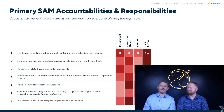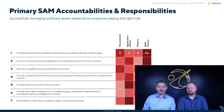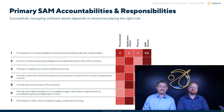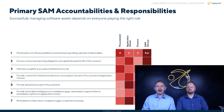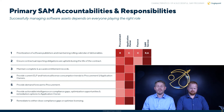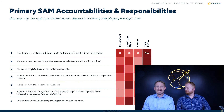Because you're working with all these different groups — whether procurement, security, or product management — they all report to different leadership, so it can be difficult to understand who is doing what as you execute on different software asset management tasks. The best way we've found to execute together is to create a RACI — a Responsible, Accountable, Consulted, and Informed chart. This chart can have different tasks that the SAM function might be leading, but each group would have a different RACI responsibility to execute. We might have someone who's accountable for one task, while other groups are consulted or informed. Without a chart like this, it's very difficult to get anything done.